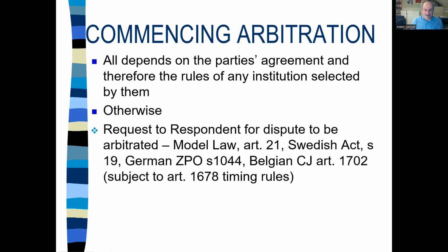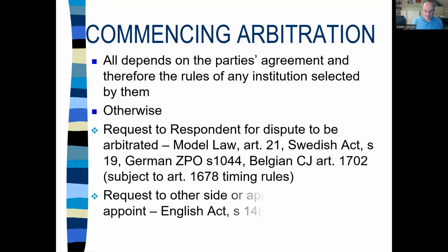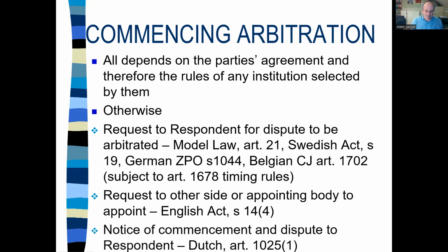This is the pretty classic answer. I want the other side to arbitrate this dispute. Just that simple request will kick off the arbitration. The English Act is a little bit more nuanced, inviting the other side or any appointing body that has been agreed to appoint an arbitrator. The Dutch, slightly different rule, but not that different. You send a notice that you've begun the arbitration and set out the dispute in question. All these things will be deemed to have commenced the arbitration.